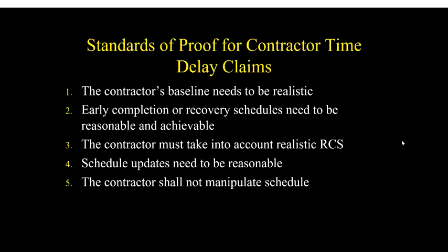Number four, just like the baseline needed to be realistic and reasonable, the schedule needs to be updated regularly, and those updates need to be reasonable, meaning they need to capture correct percent completes, correct actual starts, correct actual finishes, remaining duration for the activities that are in progress, and ideally the actual logical relationships among the activities.